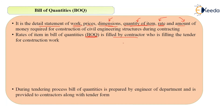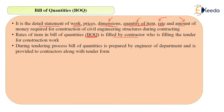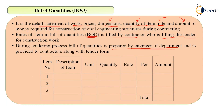During the tendering process, the Bill of Quantities is prepared by the engineer of the department and provided to contractors along with the tender form. Contractors fill in the rates during the tendering process. The BOQ is a statement of the amount that will be needed for a particular item of work.